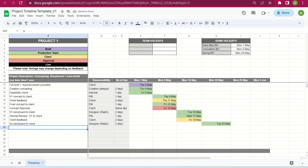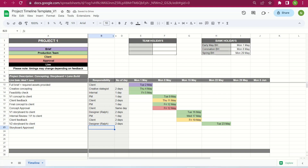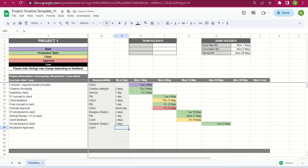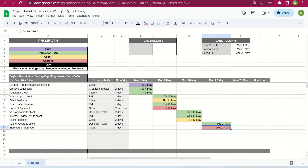After sending V2 to the client on Tuesday the 23rd of May, we hope to get an approval. You can add another round of amends if needed, but for this example: the client has seen the concept phase, V1 of the storyboard, and now V2 — we want to hope they're happy and will approve. That's the client's responsibility, and we give them one day. So storyboard approval is Wednesday the 24th of May, highlighted in red as it's been approved.